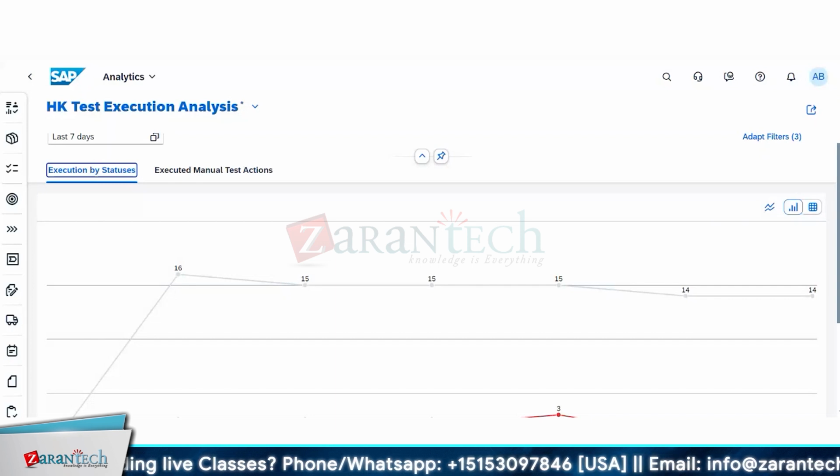So when it is counting, let's suppose you have a test case ABC and it is part of three test plans, and you have it individually also. It could be that there are some test cases which are not part of any test plan, right? So when it is calculating the total steps, it is going to count four items. One for the test case itself, then the test case is part of three test plans. So two, three, four.